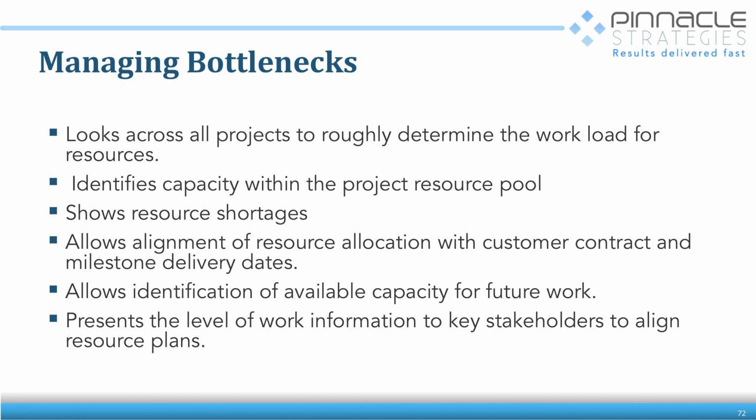a more strategic way. So up till now, right, we've been dealing with, how do we manage the work that's in front of us and how do we synchronize our execution plan and stuff. And now we're starting to control and manage not only the rate at which work is arriving, but also the rate at which we are completing, because the bottleneck is going to control how fast projects get done. So here I have control now. If I'm the portfolio manager, I've got control over the rate at which projects are completed.